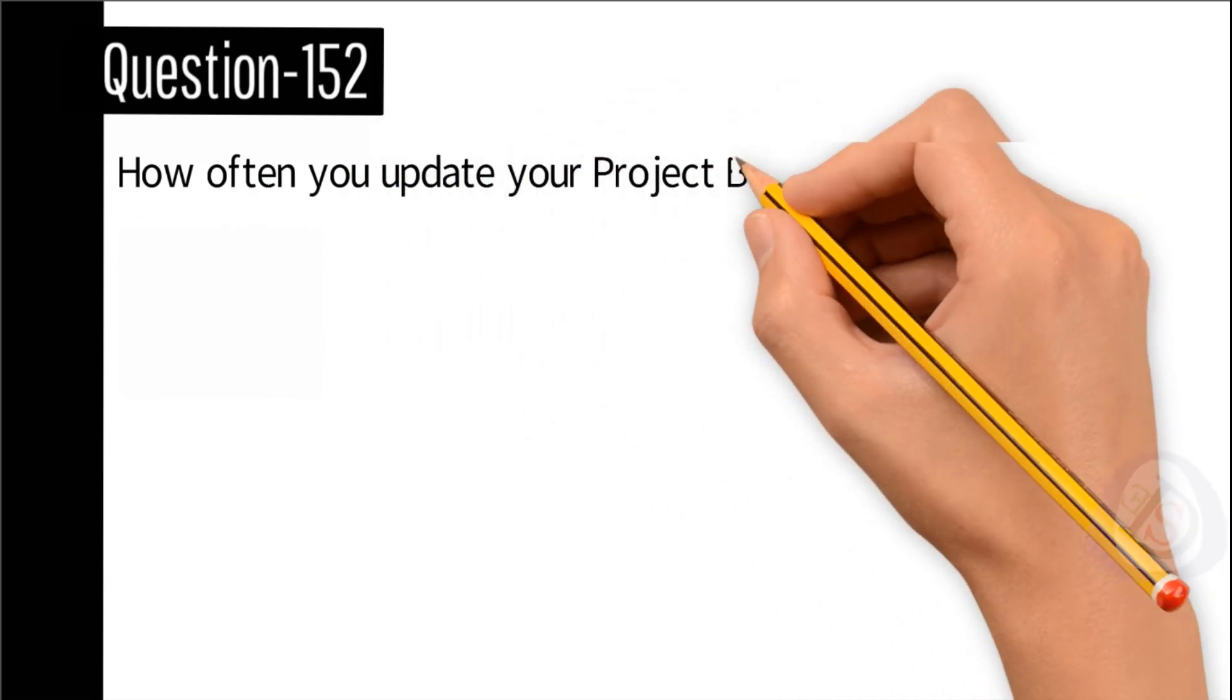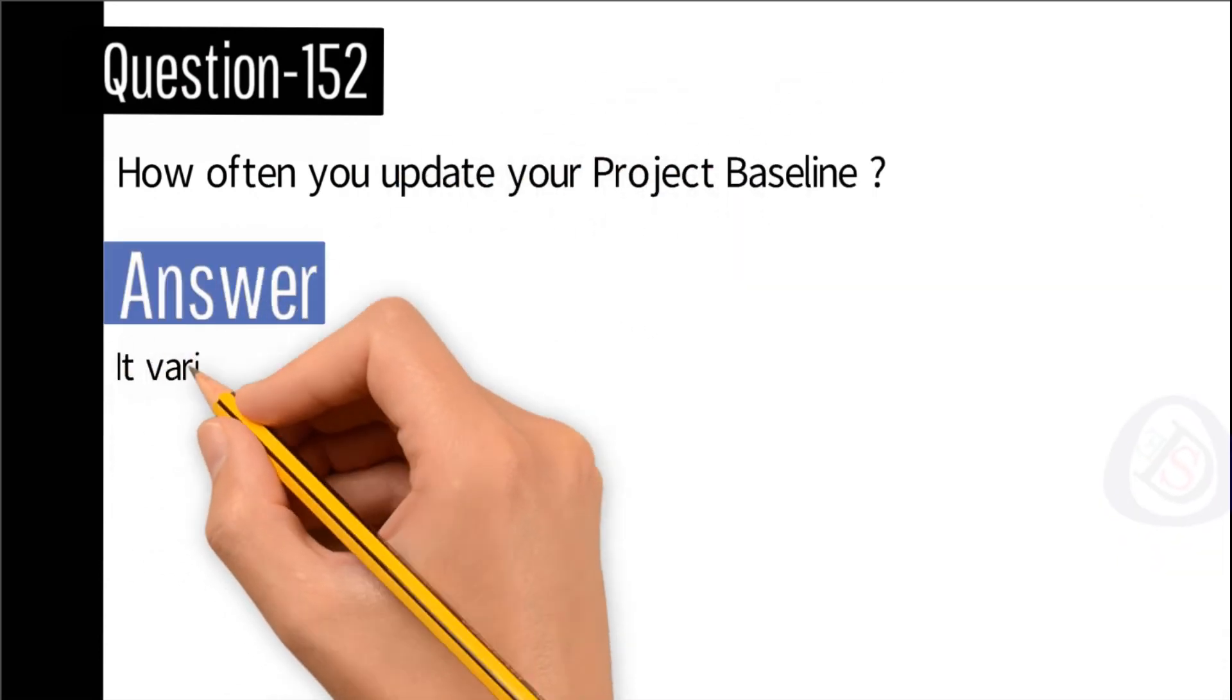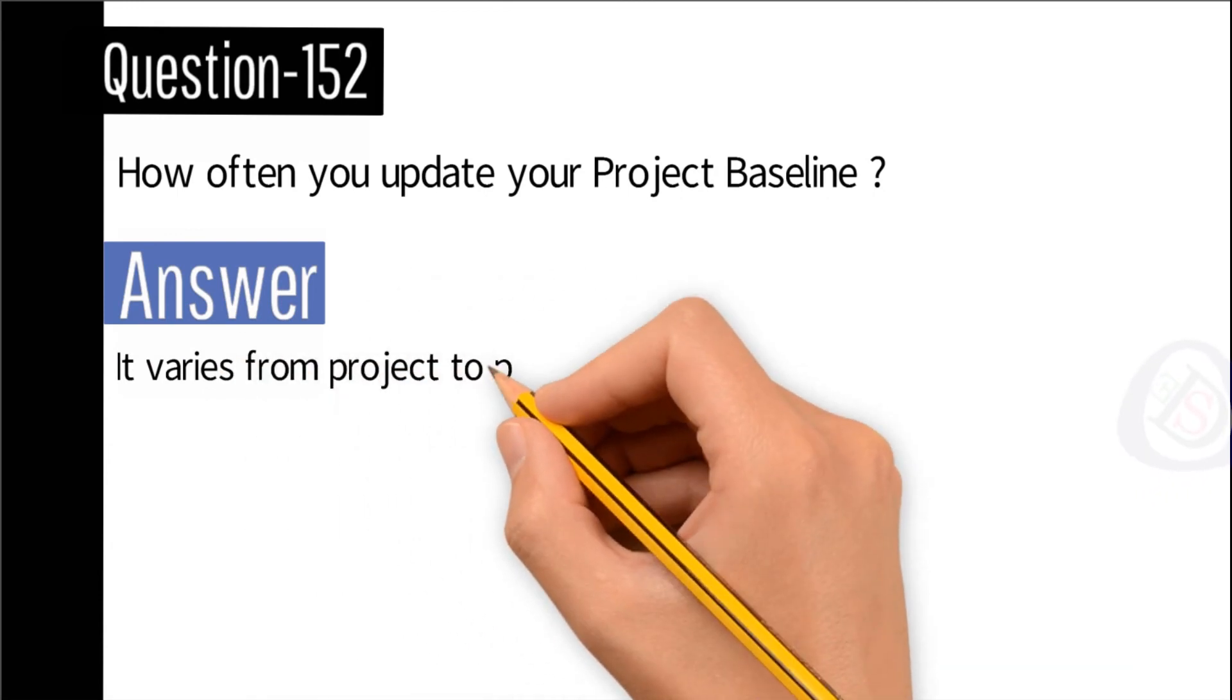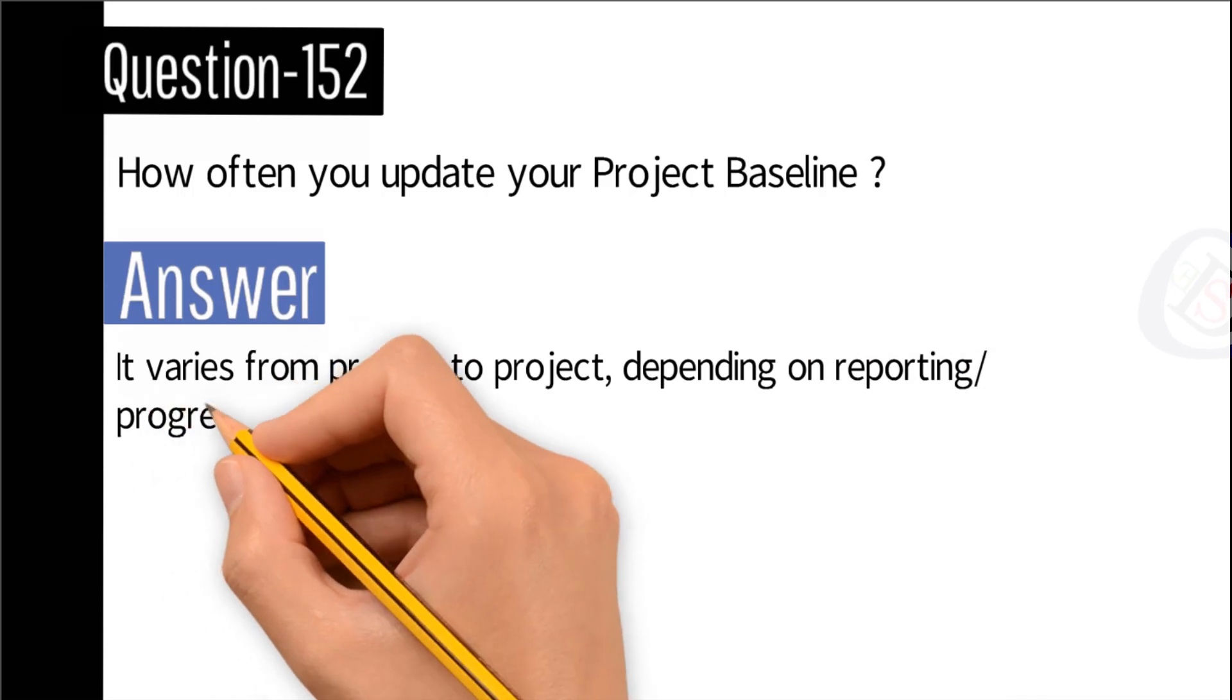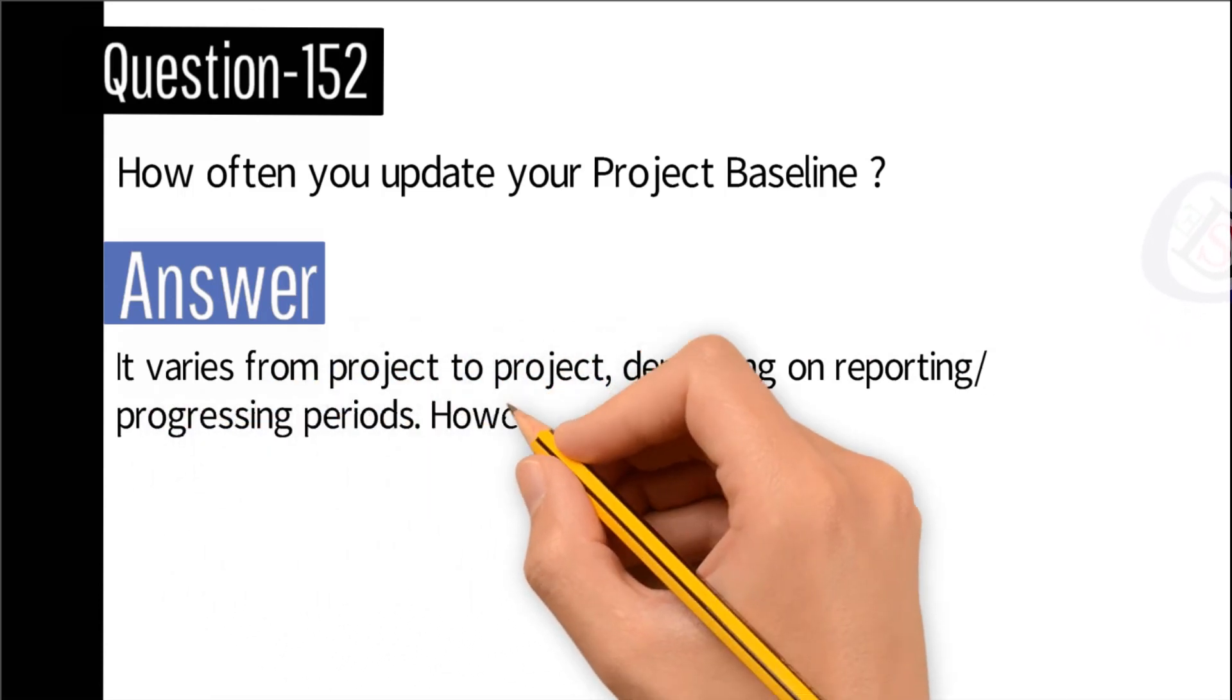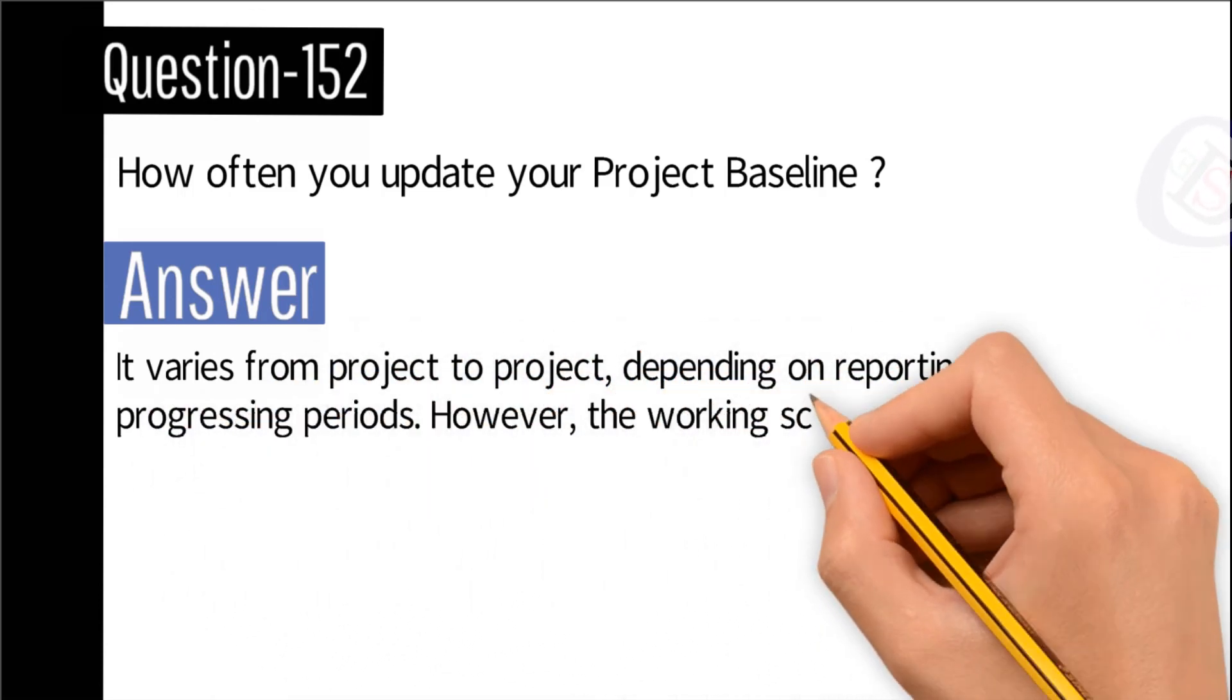Question number 152: How often do you update your project baseline? Answer: It varies from project to project depending on reporting progressing periods. However, the working schedule should be updated on a continuous basis as each activity is started or finished.